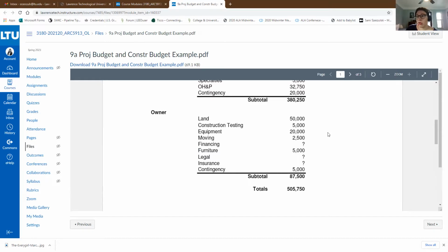For example, with a university project, owner costs might include an allocation dedicated to the time of the faculty and staff who are involved in the project, including any internal A&E teams or project managers on the project. The owners also have their own contingencies allocated as a part of the budget. So the contingency shows up a third time here. Much like the other two contingencies discussed, this provides a buffer for any unforeseen expenses on the client side, or gives them some wiggle room to make small changes during the construction process.